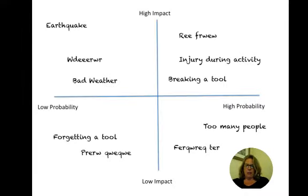The way we do that in project management is we consider this axis. The x-axis here is the probability of something occurring. So you can see there might be a low probability of it occurring, like it doesn't happen very often, or it might be high probability, something like people cutting themselves. And then the impact, that's the other dimension on the y-axis where we have a high impact of something happening versus a low impact, like it doesn't really matter that much.